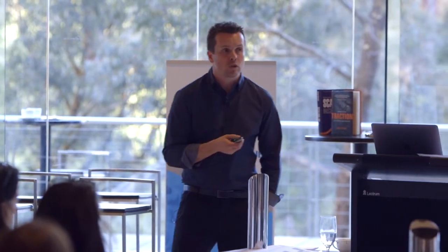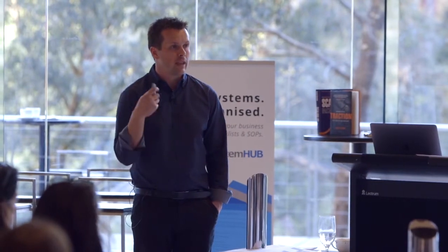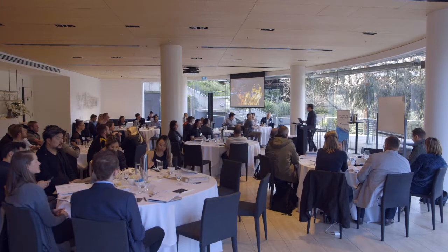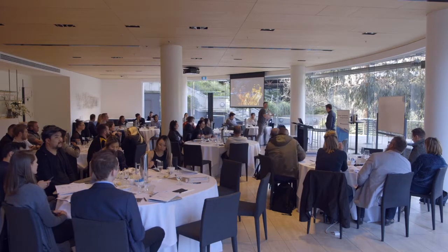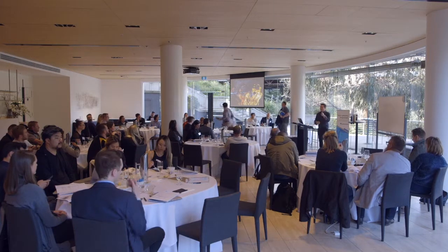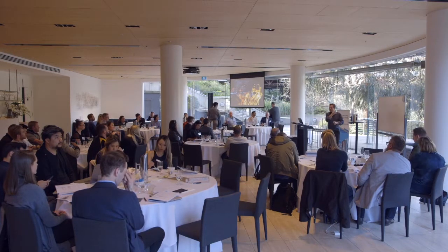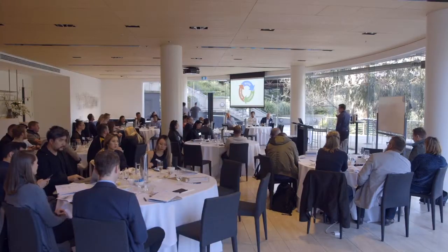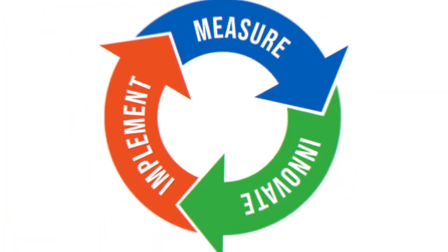You capture them, and you need to listen to your business and have somewhere in your project management tool where these things are getting logged so they can get discussed and prioritized. And then you would have a discussion with your integrator where, Dana might say, hey, doing the rubbish bins with the pulley system, that's low priority, let's move it down, and you figure out which systems are going to have the biggest impact. And it's a 3-step process, and it's more cyclical.